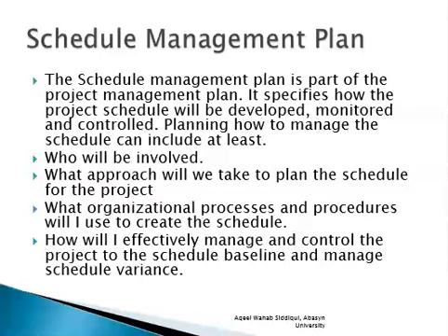And the project management plan contains all management plans, like the scope management plan, schedule management plan, cost management plan, quality management plan, resource management plan, communication management plan, risk management plan, procurement management plan, and stakeholder engagement, for instance. So these are all management plans. The schedule management plan is a part of the project management plan.